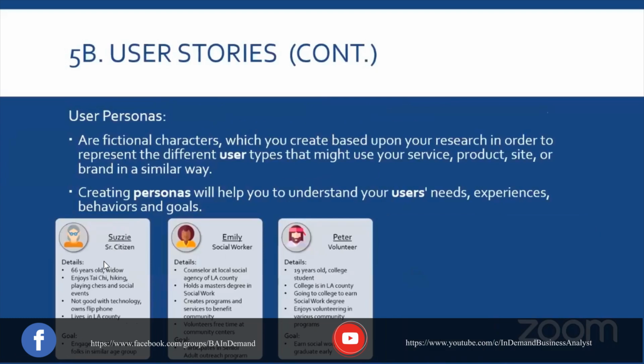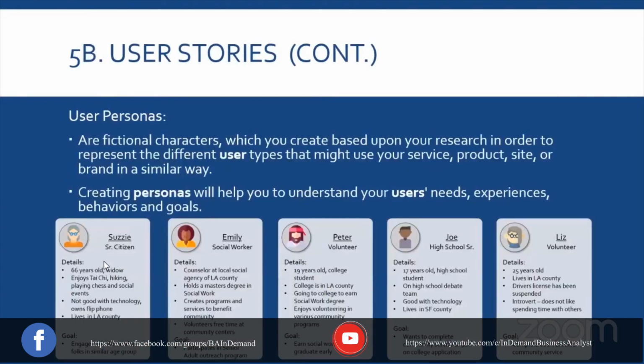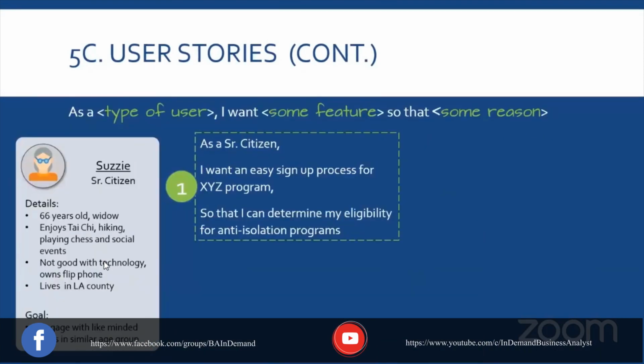So for this, if we go back, let's do this. An epic would be our home page. The features would be different portions of that home page: sign in, sign up, events, images, your navigation. So those would be all features within that epic, which is our home page.